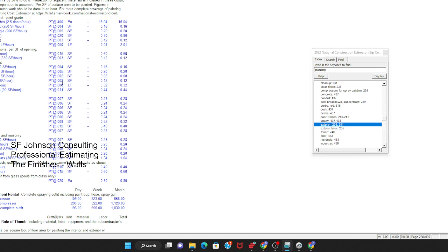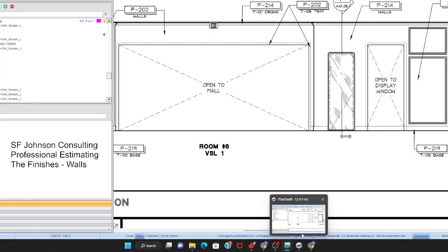0.008, as opposed to 0.004, 0.005, you know what I mean? Bookcases, yeah, that's the whole bookcase. Cabinets. So yeah, 0.011 because we're talking cabinets. That's more than linear, but look at the linear. The linear paint totals are always the most labor intensive because you have to be very accurate. You have to line it up. Keep that in mind. And if you have a lot of linears on your estimate, you're going to make some good money, but be ready to have a lot of tape.